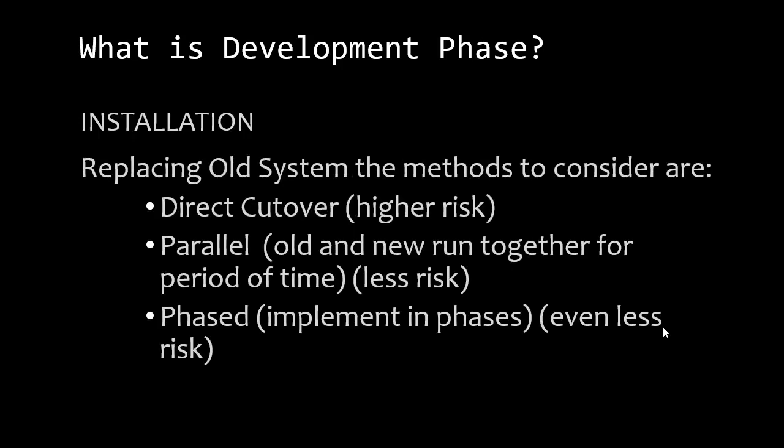However, in reality, usually what you're doing sometimes is replacing older systems. So just like I mentioned before with the data conversion, if you're replacing those older systems, a plan needs to be in place on how you're going to do so. If you replace the old system, methods to consider are a direct cutover, meaning you end the old system and you start the new system the next day. That's high risk. If something happens with the new system or it doesn't install correctly, and this system is really important to the company to do its daily work, that could be very high risk.